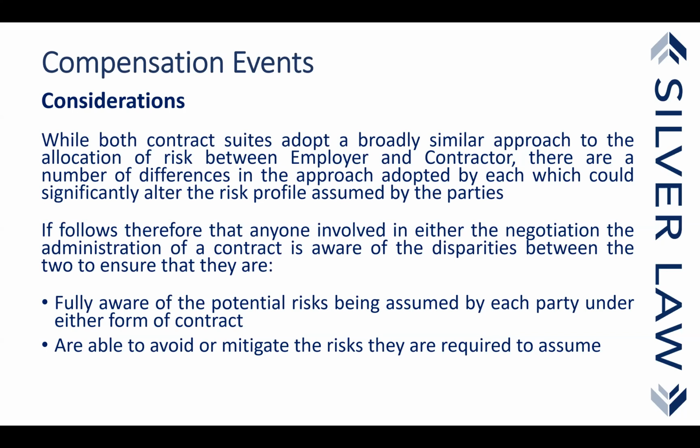First question: under option E, there is a lot of confusion about repayment. Please can you confirm the understanding that an implemented CE only adjusts the budget, as it would adjust the target under options D and E, and payment is still made based on actual defined cost, unlike option A, where an implemented CE creates an agreed lump sum? A lot of questions in there.